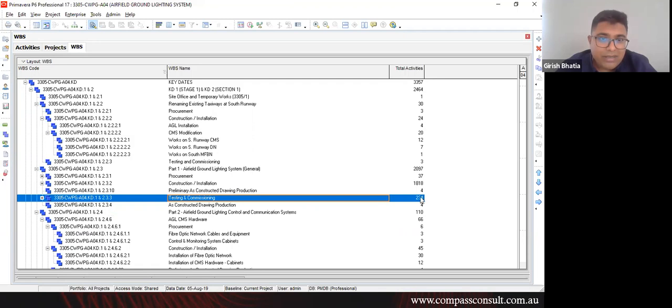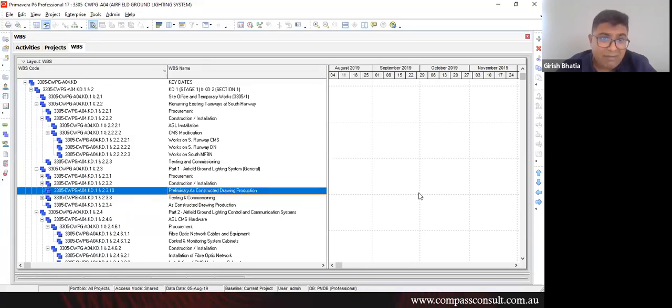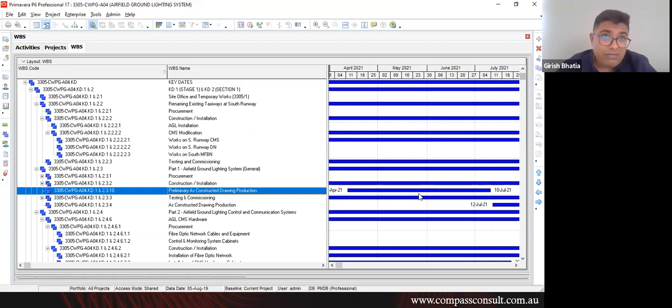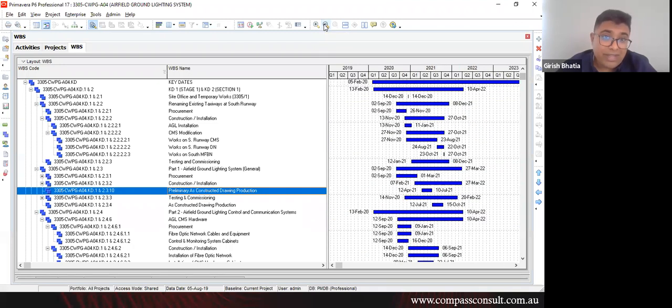So what we did is we had to break this down. This is a 5-year project basically. So we had to bring it down into design, procurement and construction phases, which are like 2 phases. One phase is the new runway, which is coming up at Hong Kong, and the other runway is the existing runway, that's a brownfield. As I told you, and me and Jyotsna were talking about, there was something we were doing with